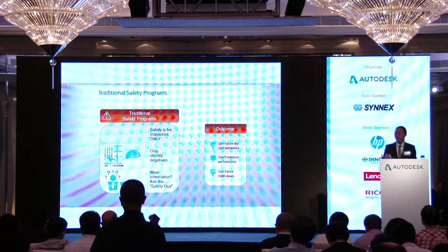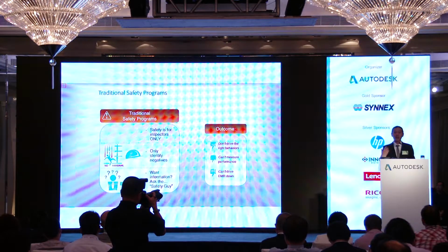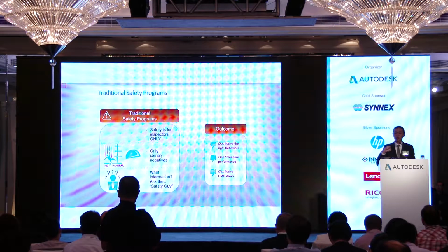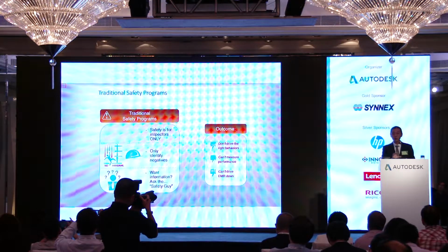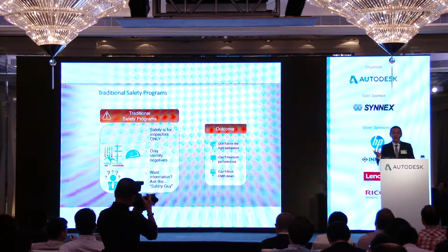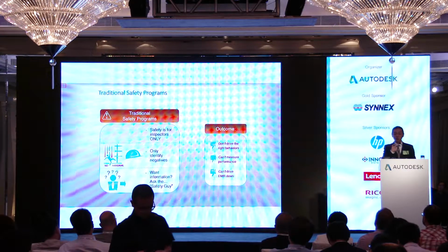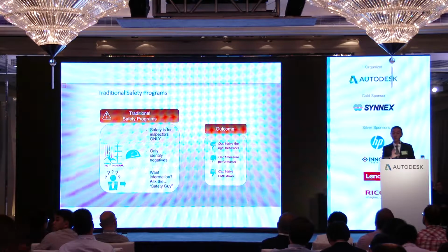Yeah, just like the traditional side of things, when you talk about safety, there's a lot of paperwork, a lot of checklists, a lot of tedious things. But with the iPad 360 Field, you pre-make your checklist, and you pretty much just tick yes, no, or NA. And once you tick no, it's going to be an issue. You just take a photo. CK is going to show you more details about Field later.